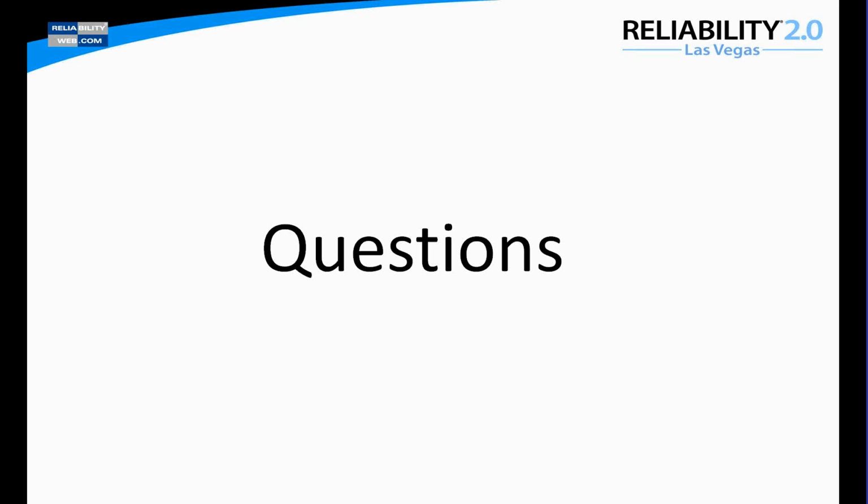So the first question is, how did Southern Company get external parties to comply with formatting of data to be absorbed? And what level of compliance do you see? Both those questions are wonderful, and there's a best case scenario, where we have an external partner who has agreed to use our configuration of our authoring tools. So we have an EPC right now that is using our configuration of AutoPlant to do their design. And again, it goes through the same quality management process as our internal design.